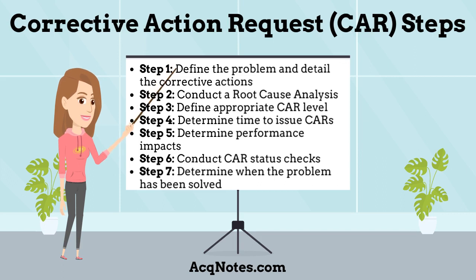Step 5, determine cost, schedule, and performance impacts of the CAR. Step 6, conduct CAR status checks. And finally, Step 7, determine when the problem has been solved. These are the 7 steps associated with developing and executing a CAR.